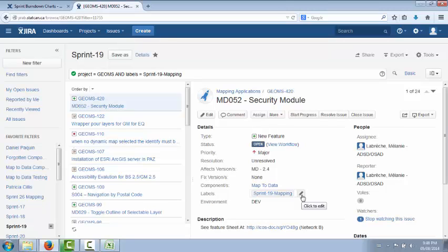Once this is done, typically what we do is we send it to clients just as a final confirmation of the feature that will be implemented in the next sprint. And then this gives them the opportunity to confirm that they will commit to not disturbing you in terms of new development or new features for the next 2 weeks. So they might log bugs, they might log problems or issues, or ask you to do more analysis work. However, your developers should be free to continue work for the next 2 weeks without interruption.